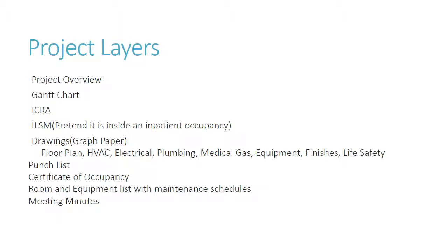Understand when we do Gantt charts, actually we'll talk about that in a moment as well, but I'll mention this twice, I guess. If the project is going to last 7 or 8 weeks of construction, you probably have twice that in planning. So while you will throw this Gantt chart together pretty quickly, know that when it comes to planning and mobilization of equipment and orders and capitals and POs and contractors and all those kind of things, it probably will take legitimately somewhere right around 16 weeks or 3 to 4 months, maybe even longer, depending, to actually start a project. And we're going to do it much quicker because we're doing it more in theory.